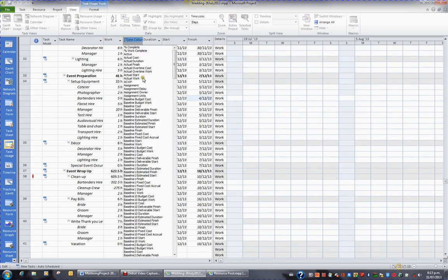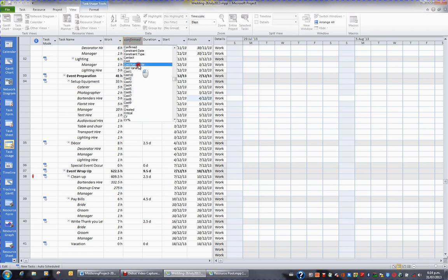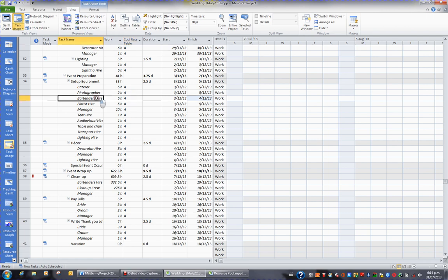I'll then press C to jump down to those fields beginning with C, and I'm after the Cost Rate Table. When I click the Cost Rate Table column, I now see a column showing me that all of these resources have been charged at their A rate.